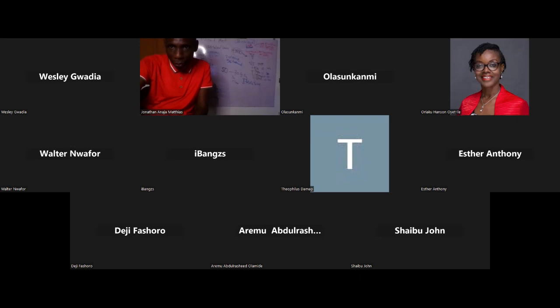All right. Let me take a question in the chat box. Being a QS, and with the experience I had with those in the technical, I don't work with BOQ again. Yes, so this is a QS saying he no longer uses the BOQ method again. It just goes straight to the material and labor schedule. Yes, Mr. Sukomi has done some work for me. So just go to material and labor. It helps you to populate it into your MS Project at the back end. We will see that next class.